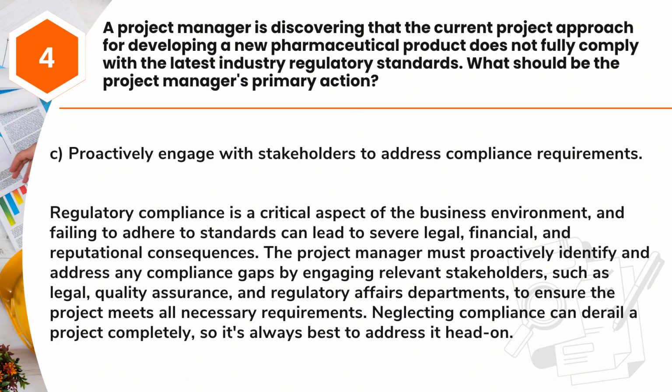The project manager must proactively identify and address any compliance gaps by engaging relevant stakeholders, such as legal, quality assurance, and regulatory affairs departments, to ensure the project meets all necessary requirements. Neglecting compliance can derail a project completely, so it's always best to address it head-on.